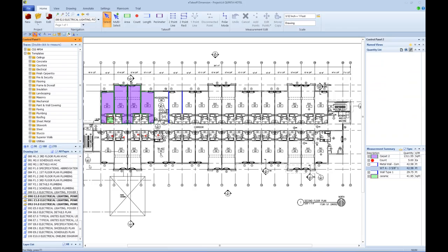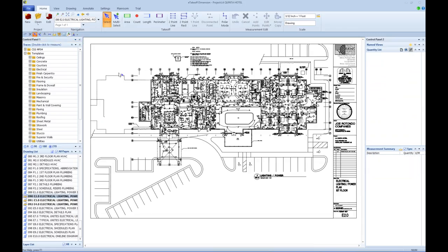this electrical drawing. We're going to talk about the pattern search. Pattern search searches a drawing for a specific pattern. You tell the program by outlining the pattern on the drawing what it is you want to search for, and then you tell it where you want to search. So we call that a search area. I pre-designated an area on this drawing. That's my search area.